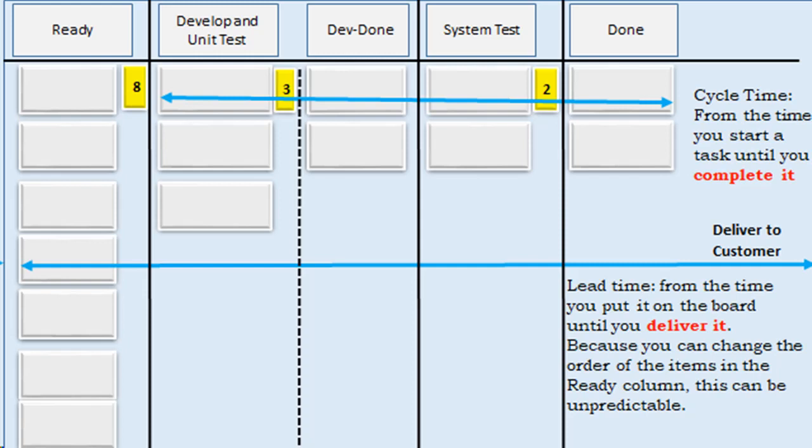Each feature is unique, so its cycle time is unique. However, a product owner might notice that smaller features have smaller cycle times. The product owner wants to see throughput, so the product owner creates smaller features or works with the team to do so. Burn-ups, burn-downs, capacity measures, and lead time and cycle time, predictability measures, are useful for in-the-moment measurements. They help a team understand how much more work they have and whether the team might finish on time.